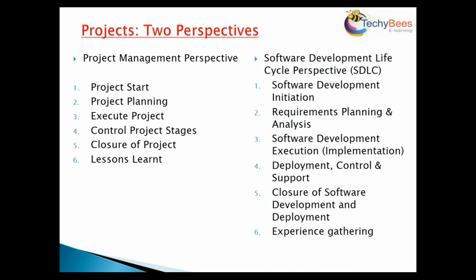In terms of planning, you must know how many resources are needed, how many cubicles are needed, how many computers are required, what are the various assets required, do you have to procure a new server, do you have to get a space in a data center. So what is a data center? A data center is a server room.